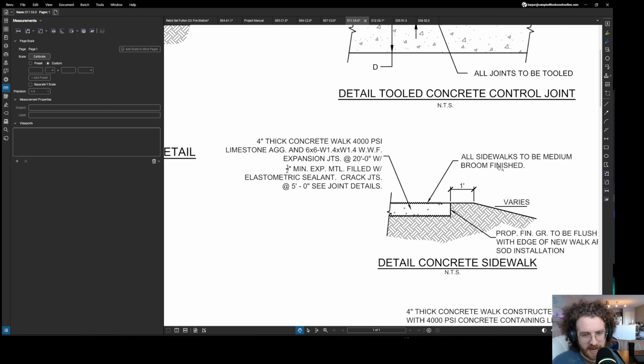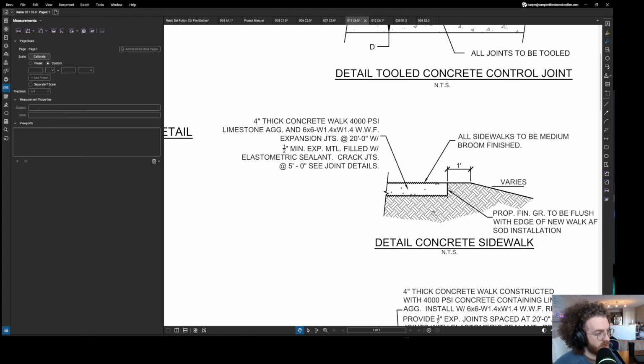If it's a washed aggregate finish, sometimes that can cost a little bit more per square foot. But we're also looking to see if they need 4 inches of sub fill, 4 inches of CR610 gravel, stone, something to put under. If we're cutting that under part out and then filling with 4 inches of something before they pour the sidewalk. That's not standard with sidewalks. That is standard with foundations and slabs and things like that. Maybe dumpster pads, but if it's in there, they need it.